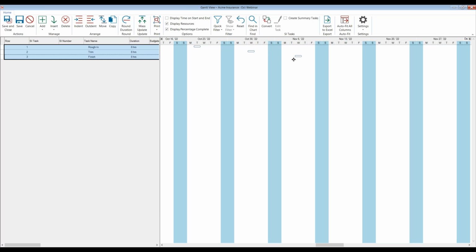What we're doing is pulling the estimated time for these items in, and then later as you're using our mobile tools, we can track the actual times, and you can get some real-time job costing to see how you're performing on that job as you go.